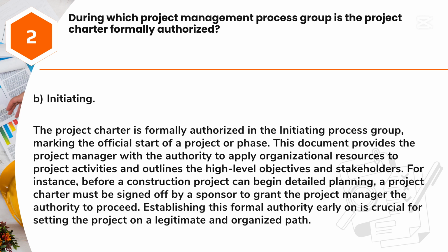Answer: B. Initiating. The project charter is formally authorized in the initiating process group, marking the official start of a project or phase. This document provides the project manager with the authority to apply organizational resources to project activities and outlines the high-level objectives and stakeholders.